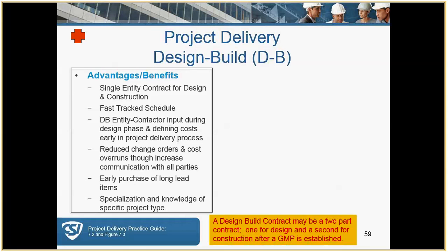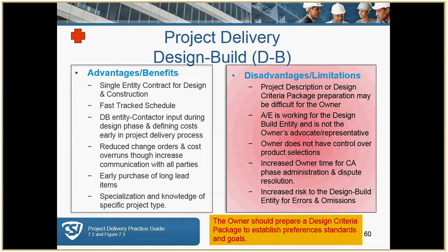However, the architect has always been kind of an advocate of the owner. In this case, that's not going to be the case, because the architect is working for the contractor, and that role as advisor that the architect traditionally has taken in the past doesn't quite pan out in this case. So again, we have advantages.